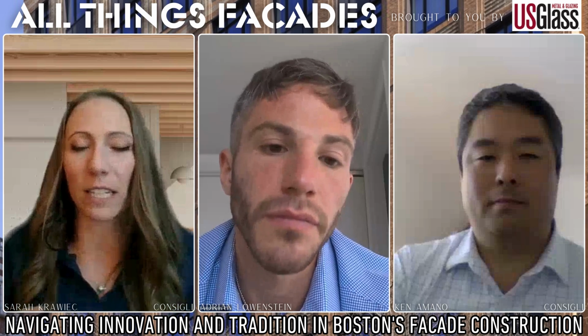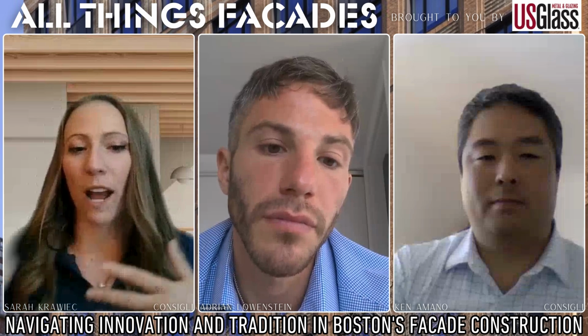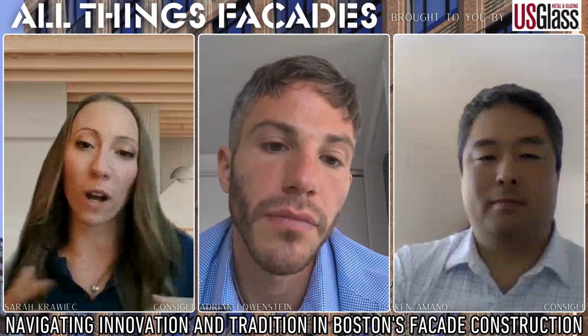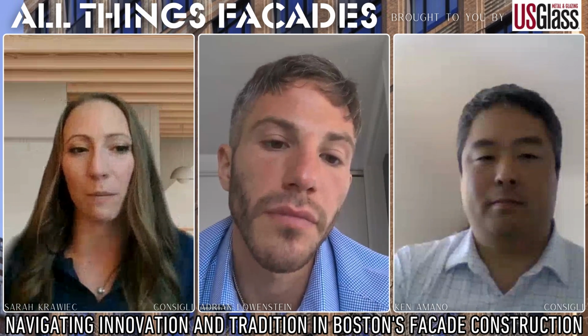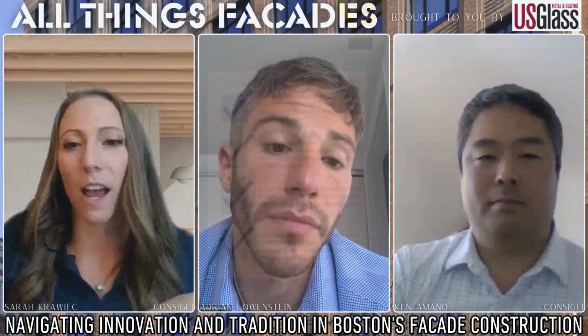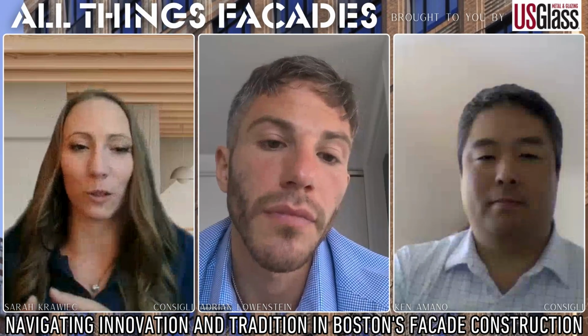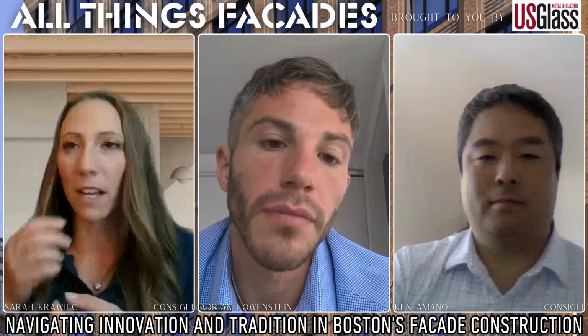And what that looks like is different based on the region and the types of weather that you have. Right now, we're having quality summits talking about the different products that we've used on this project compared to that project, what worked, what didn't. And as Ken mentioned, having that live feedback of something that happened a couple months ago on one project, now we're communicating that to another project that's in pre-con, and to another team that's installing it now: let's look out for this component, especially moisture wicking.